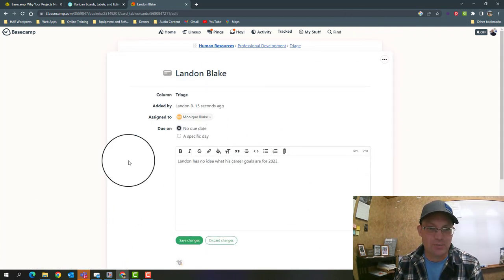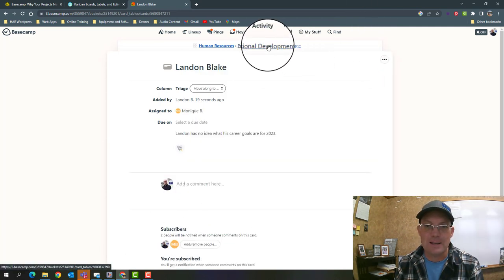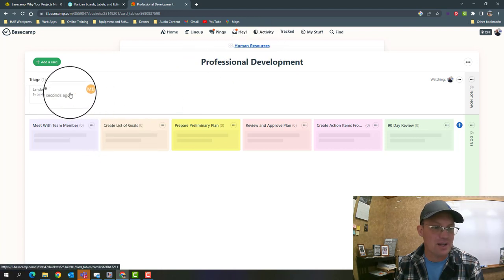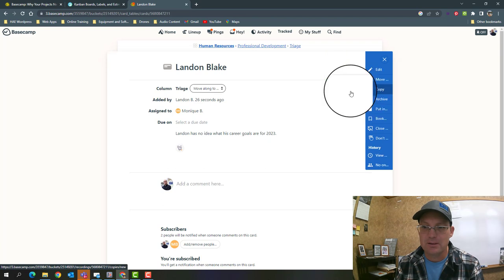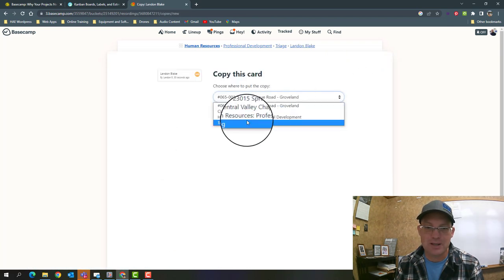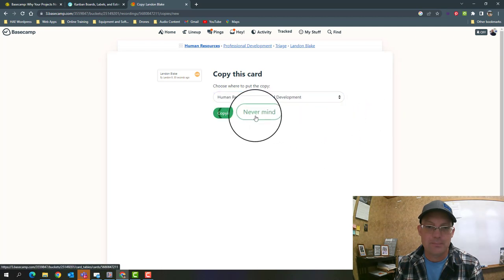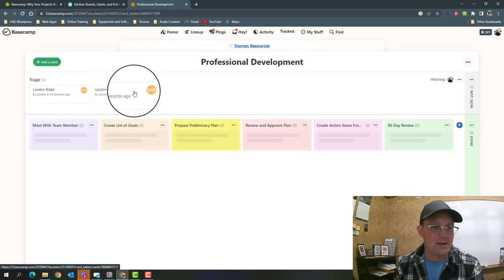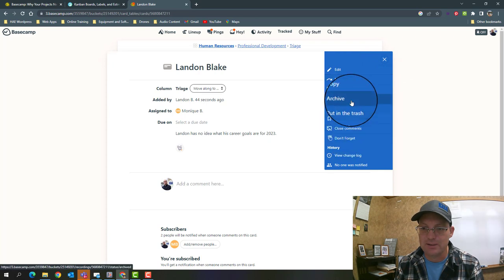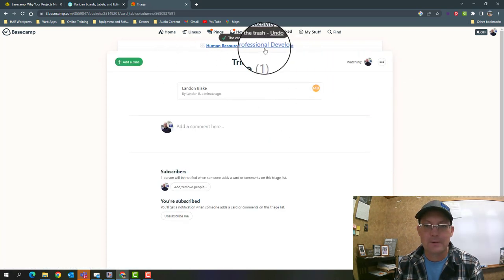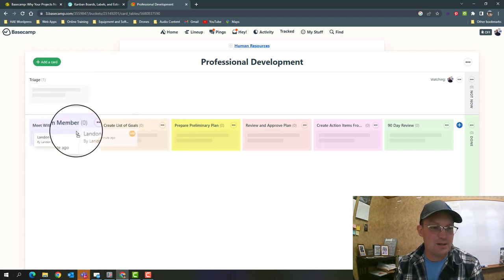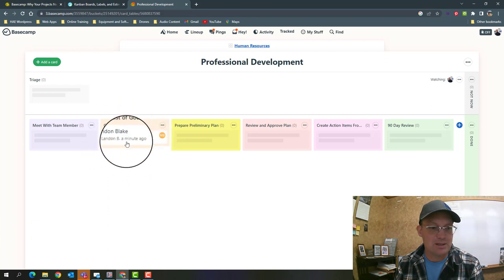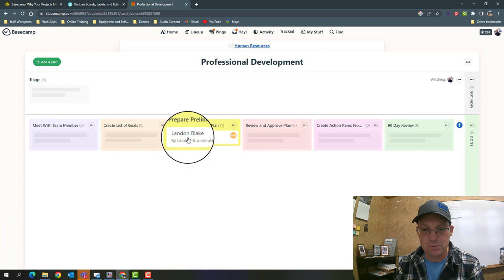Just so you know, one thing I like to do in Trello is have a template card that I can then copy, so I don't have to retype all the stuff in this box. You can do that here. Once you have a card set up, you can come in here, go to 'copy,' and tell it to put this in the card table. When you come back here, now I've got a copy. You can set up a template and use it that way. Let's go ahead and delete this. Now I've got my card and I can drop that down here. We're going to say Monique needs to create a list of goals for Landon, and as this person moves through the process you can move the card.